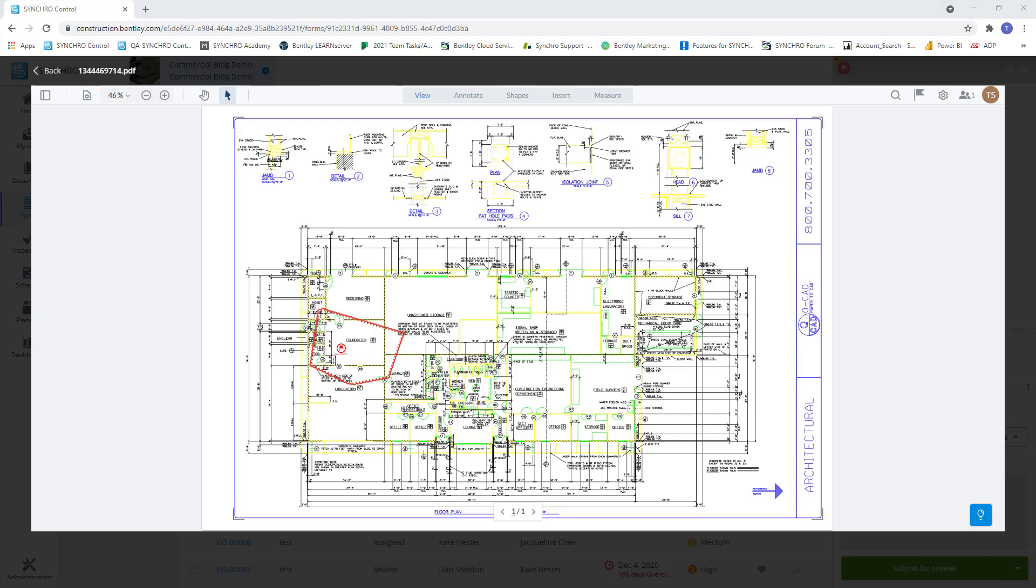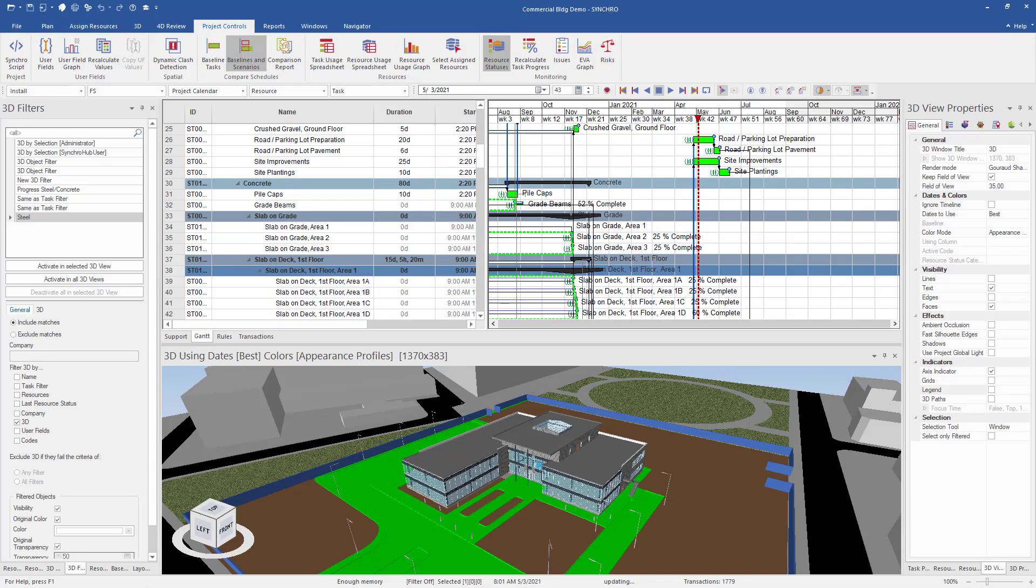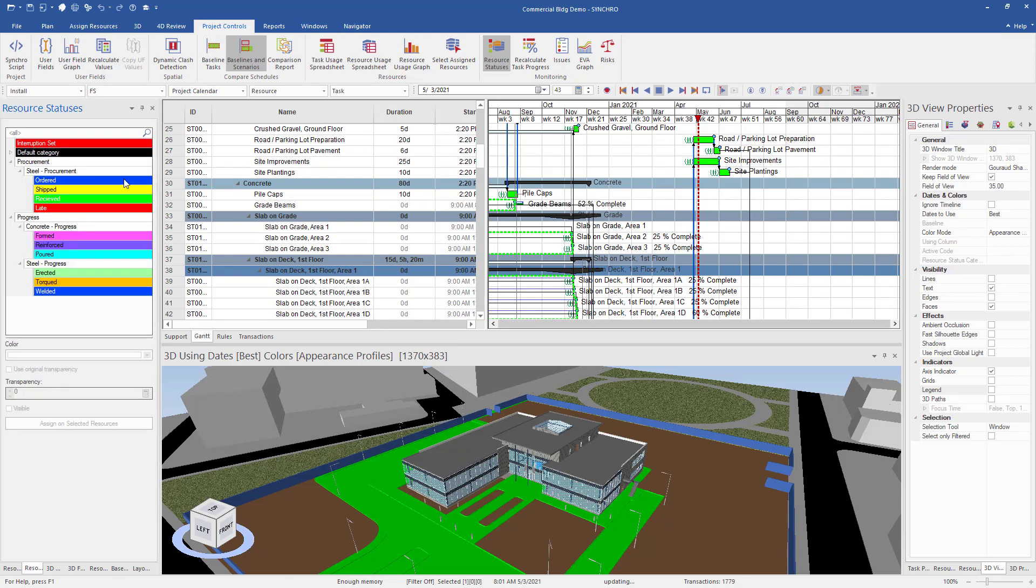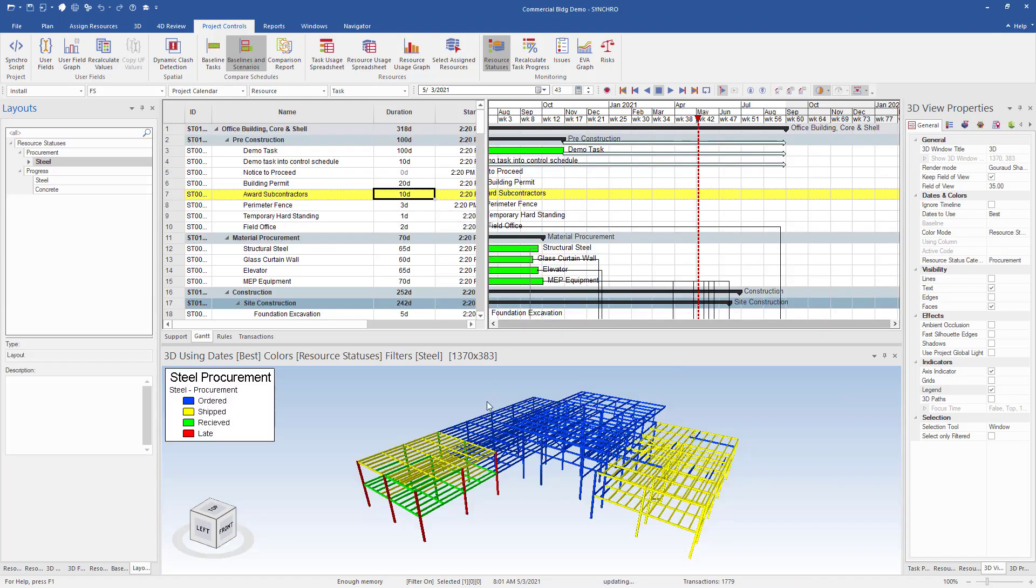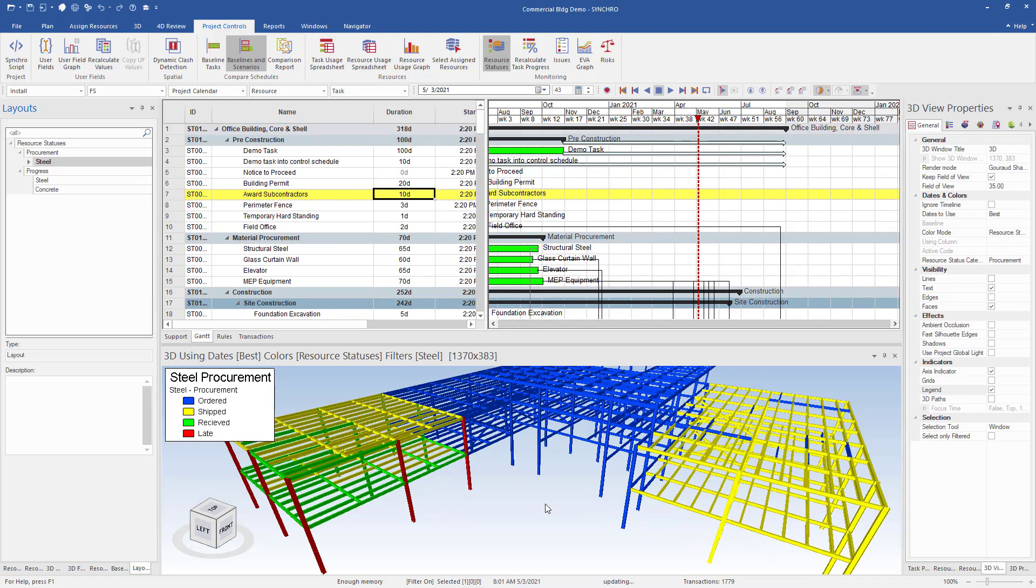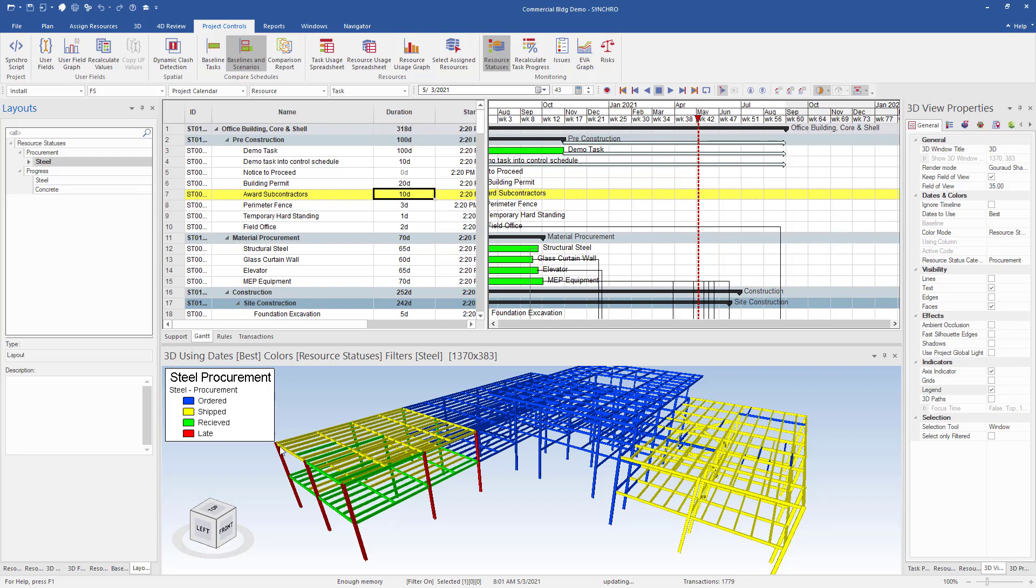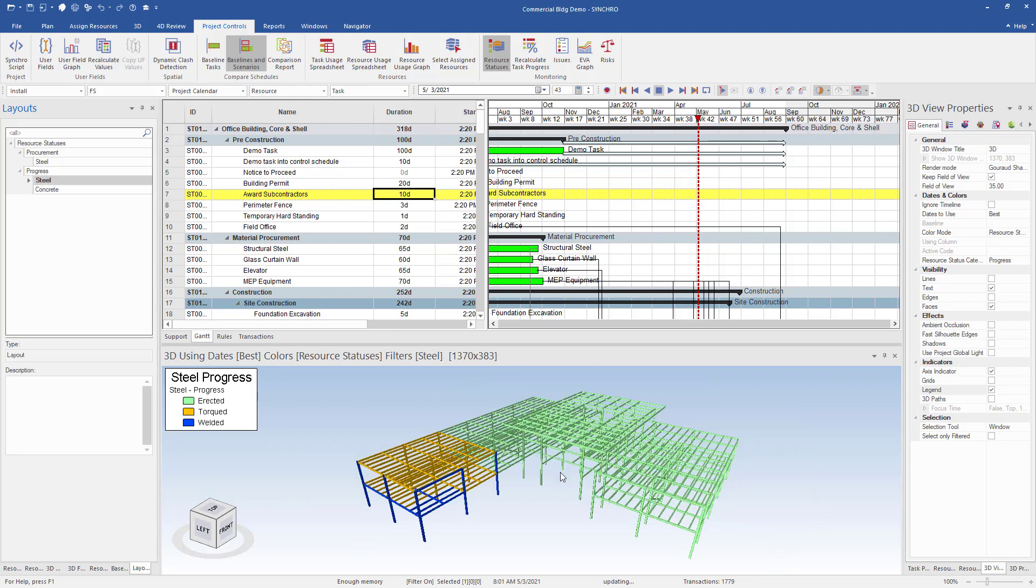Now let's jump back to 4D Pro and set up resource statuses to help us identify statuses such as procurement, progress, inspections, or any objects that you want to color code and track. We can even use resource statuses to update our schedules from the field. Now you can see for our steel procurement resource statuses, we have blue as ordered, yellow as shipped, green as received, and red as late.